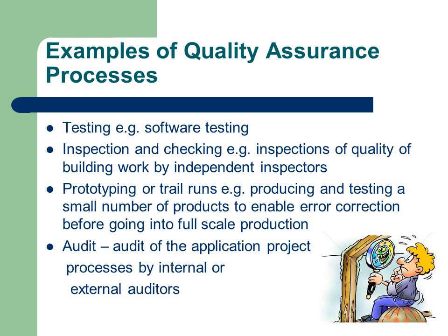Examples of quality assurance processes are testing. The development of computer software goes through various levels of testing such as component or unit testing, system testing, and finally user acceptance or business testing. All levels of testing are carefully documented and managed by specialist groups of people.